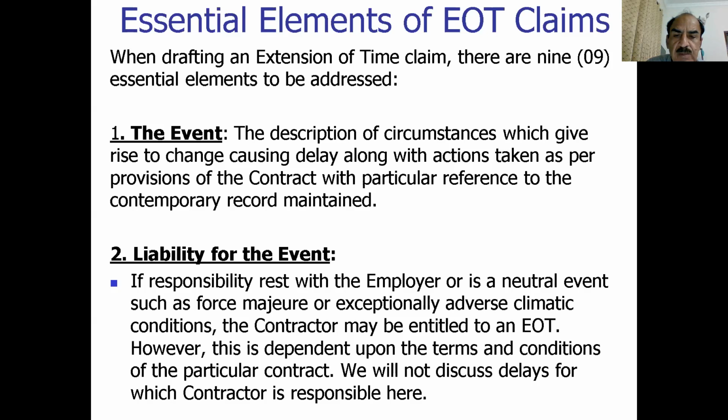The second is the liability of the event. If responsibility rests with the employer or it is a natural event such as force majeure or the non-possession of site or the delay in release of funds or any other thing which could lead to the closure of project, suspension temporarily, or even the weather condition. So in such condition, the contractor may be entitled to the extension of time. However, this is dependent on the terms and condition of the particular contract. We will not discuss delay for which contractor is responsible here. When the contractor is responsible for delay, we know that we would go for the liquidated damages, and that would depend on the spirit of contract.